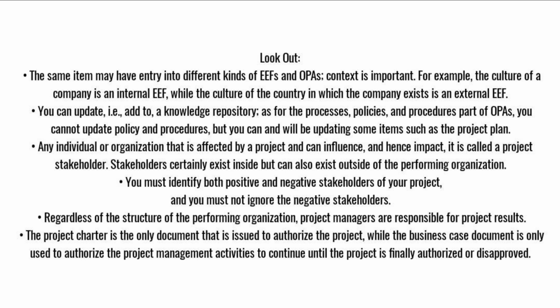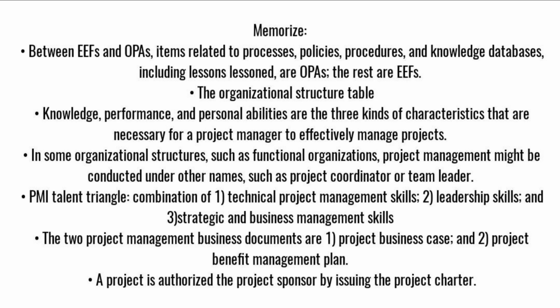The project charter is the only document that is issued to authorize the project, while the business case document is only used to authorize the project management activities to continue until the project is finally authorized or disapproved. Memorize. Between EEFs and OPAs, items related to processes, policies, procedures, and knowledge databases, including lessons learned, are OPAs, the rest are EEFs. The organizational structure table.